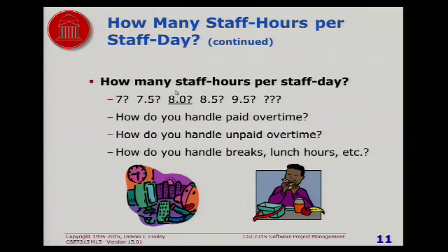Many organizations assume 8 hours per staff day, at least in the U.S. Now, I once talked to a guy who had worked in Korea, and over there it was more like 10 was the normal assumption. And if you go to certain countries in Europe, it's more like 7 or 6 because of the way their methods of counting people work.